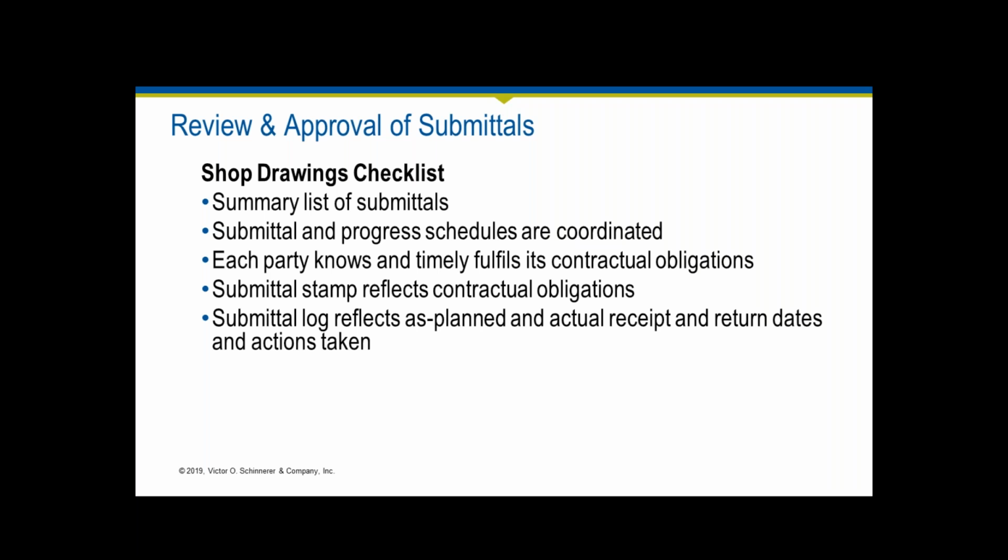so that for the next job, even if it's taking longer than expected, you should be able to refine and improve your processes. If you are in a lump sum environment, you can say, okay, well, I thought it would take me this long, it took me longer. We need to rework how we're going to price this part of the project. These are the issues that need to be considered if you want to be able to maintain profit during the construction phase.